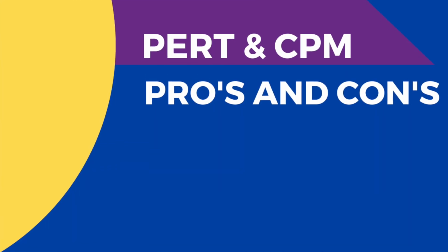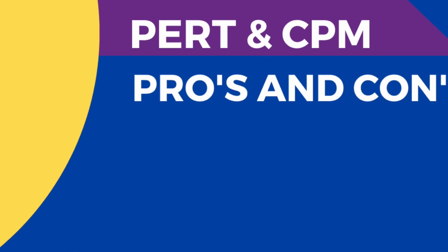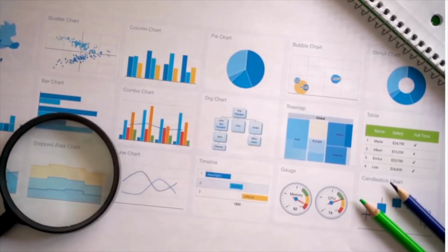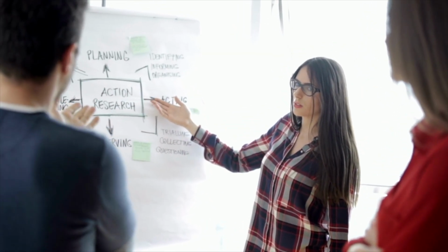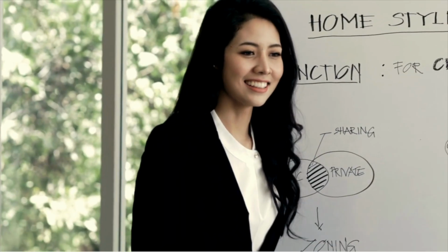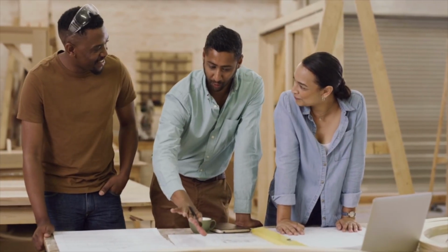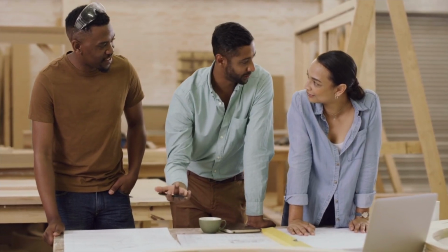Now let's go through some pros and cons to help you clarify how a PERT chart can help. First, it can help you assess lag time and lead time for orders like assets. It can help you understand information you need from other departments and the time it will take to get them. It can help you merge information from multiple locations, especially when it comes to critical path where there are a lot of complexities. You might have a precursor project that leads into your project. It can help your company understand that and how it fits into the critical path. And if you're not sure about the reality you're going to face during your project, PERT charts are great what-if scenarios. So they can help you plan, but also look for risks and unknown outcomes.